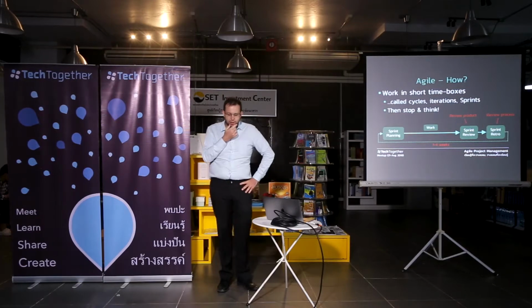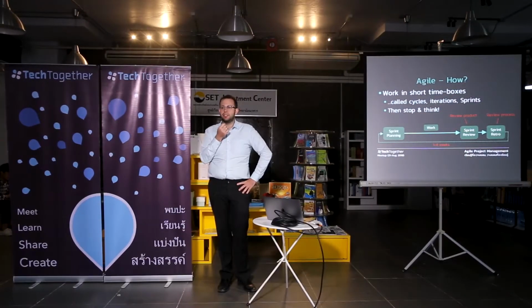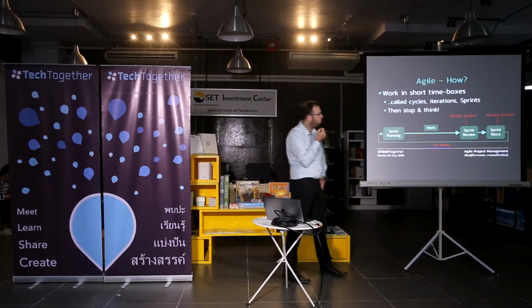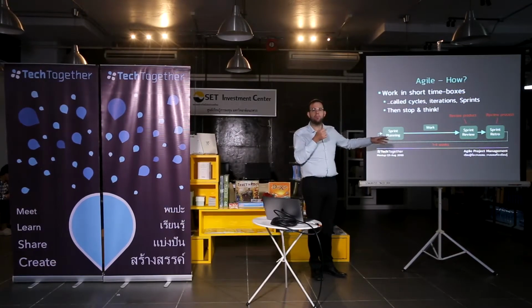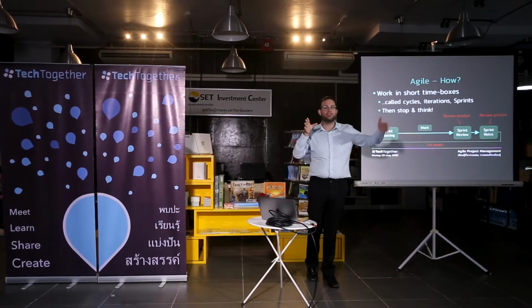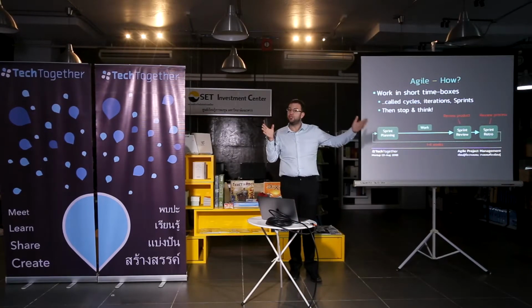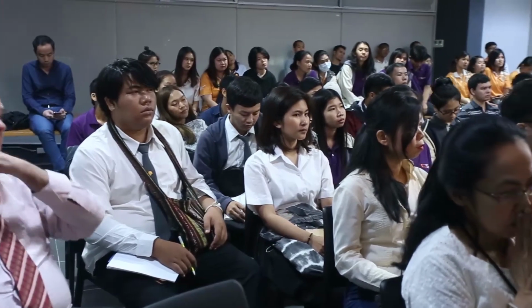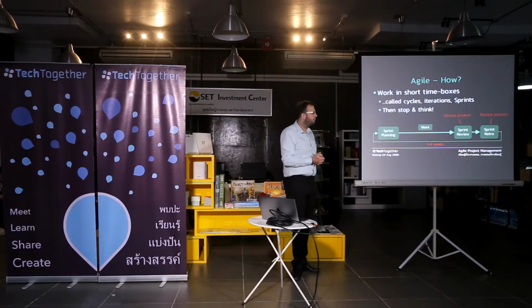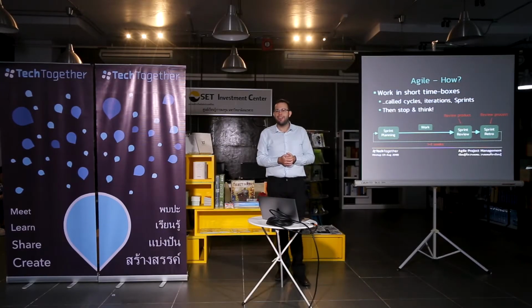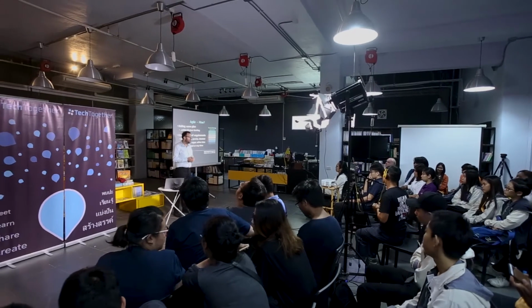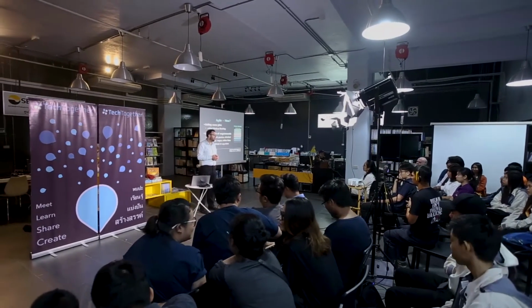I would say there's 3 main ideas in Scrum. One of them is the time box. So you pick a repeating unit of time, maybe say 2 weeks. And then every 2 weeks you pick some work to do, you work on it, at the end you review it, and you review yourself as well. And then you restart. So you pick another piece of work. There's lots of advantages for this. Actually, one of the ones I didn't mention was commitment.